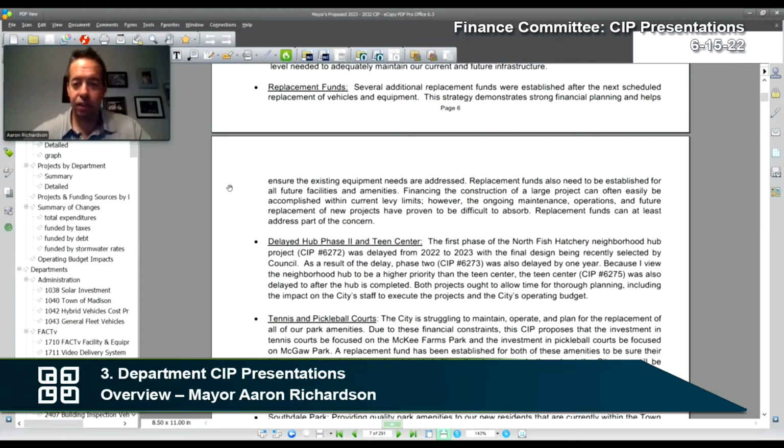I did delay a year Hub Phase 2 in the Teen Center. As you know, we just approved Phase 1. There's still a lot of work to do in that. And so naturally that to me makes sense that we're just going to have to push back Phase 2. We lost the staff person that was working on that. We just have to. There's no staff to do this. We're still trying to finish Phase 1, and that's next on the line, but it's just not going to happen, feasibility wise, next.